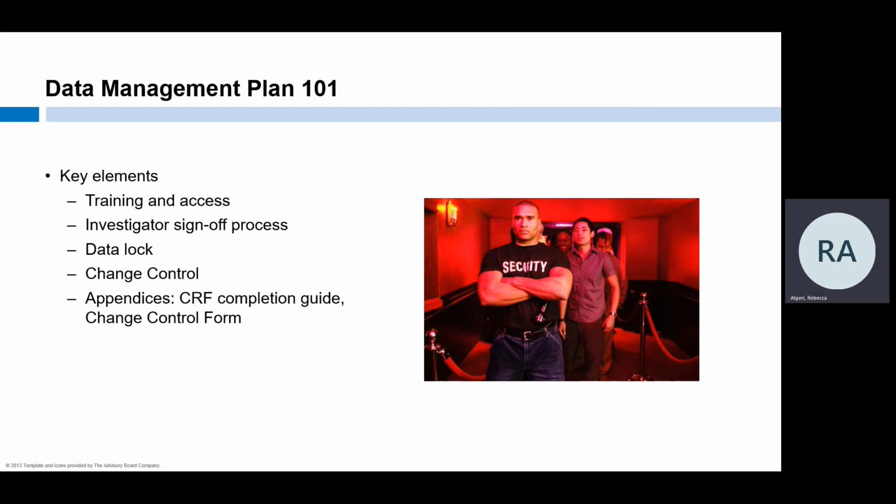How do team members who need access to the database get set up, and how will they be trained on how to use the study database? Ensuring that only appropriate members of the study team have access to the database and that their access is right for their role is an important element of securing the data. How will the investigator sign the CRFs? Remember that this is an element required by GCP.